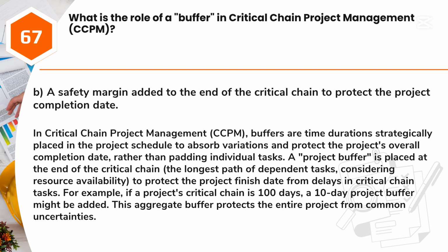A project buffer is placed at the end of the critical chain, the longest path of dependent tasks, considering resource availability, to protect the project finish date from delays in critical chain tasks. For example, if a project's critical chain is 100 days, a 10-day project buffer might be added. This aggregate buffer protects the entire project from common uncertainties.